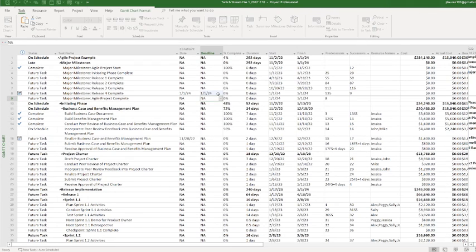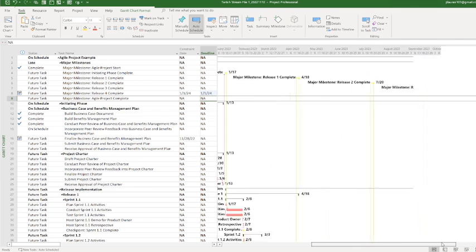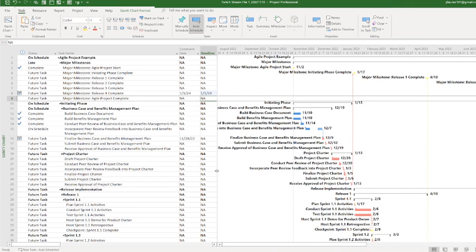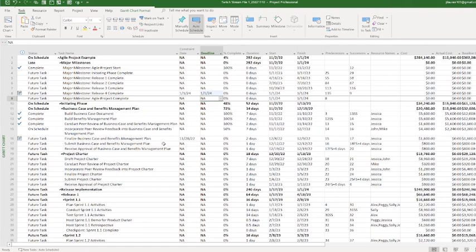And as you see, it's not going to do anything. It's just going to add a little indicator. So see that arrow, which you can change to anything really, that arrow right here is your indication of your deadline. And again, it doesn't affect or impact anything. It's just there to show you this is your deadline.